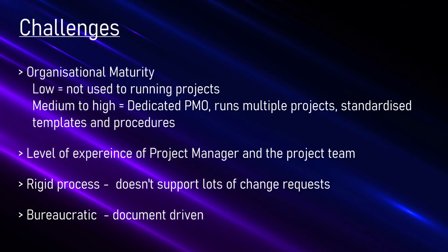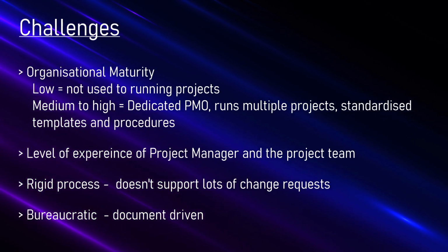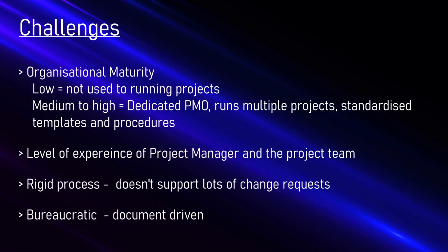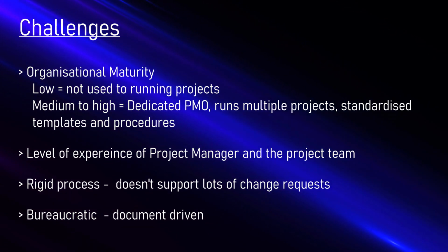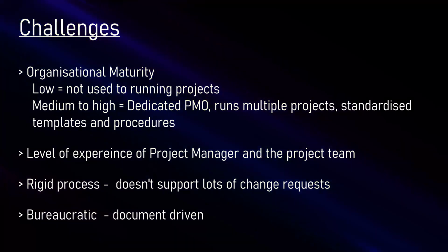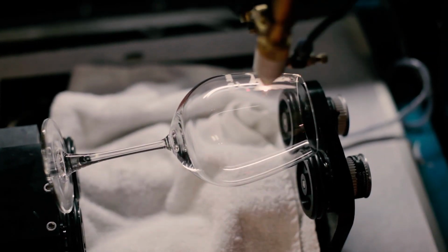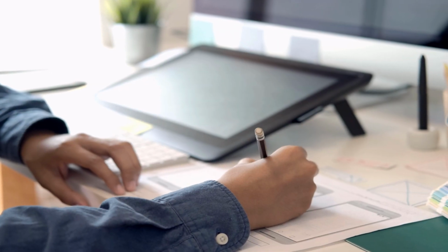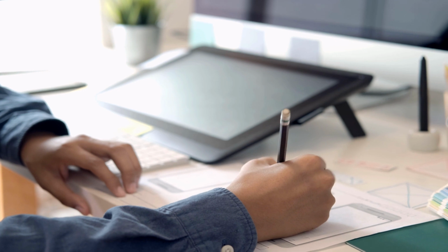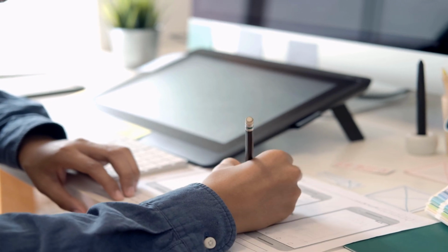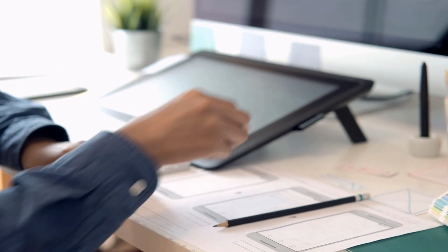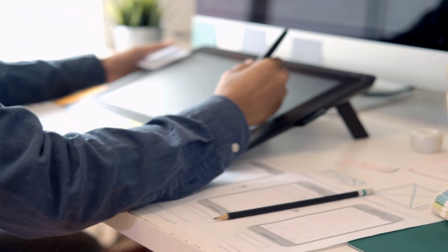Challenges that are more specific to waterfall are that it's sometimes perceived as a rigid process. Because planning is conducted up front, prior to developing and/or deploying a solution, it limits the ability of the project team to manage changing requirements. Hence, if a client changes their mind near the end of the execution phase, it can require the team to go back to the design and planning phase, which can either be uneconomical or result in significant delays. This is one of the main criticisms of using Waterfall to run a software development project.